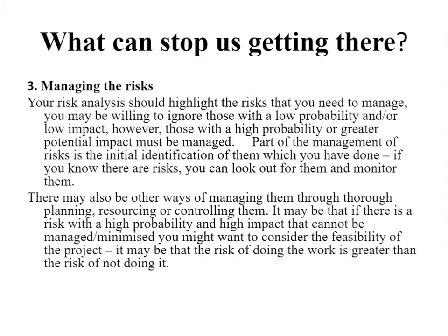Part of the management of risks is the initial identification of them. So, if you know there are risks, you can look out for them and monitor them. There may also be other ways of managing them through thorough planning, resourcing, or controlling them. If there is a risk with a high probability and high impact that cannot be managed or minimized, you might want to consider the feasibility of the project, because it may be that the risk of doing the work is greater than the risk of not doing it.